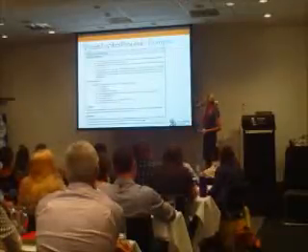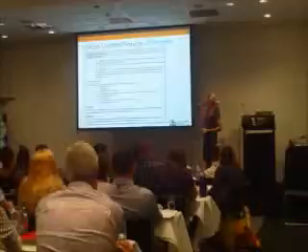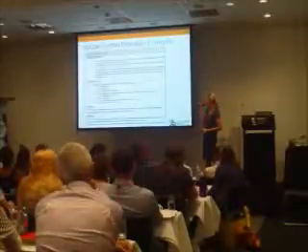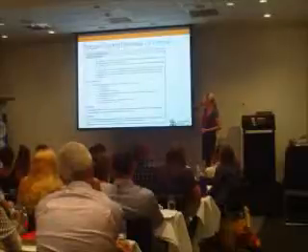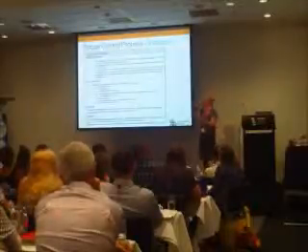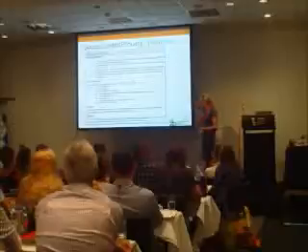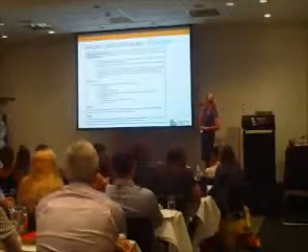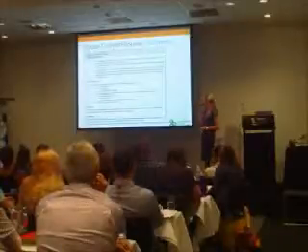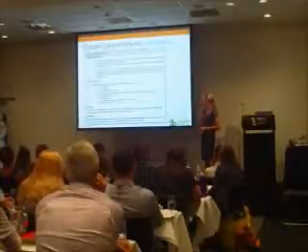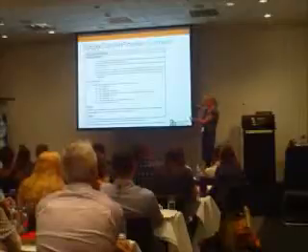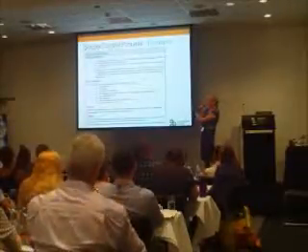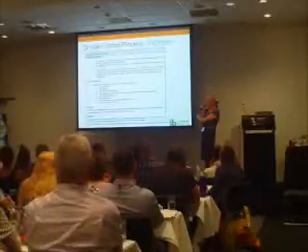Change evaluation. The project manager should determine how the change will affect the schedule, budget, contractor staff, the ordering, yada yada, the quality, the risks, the stakeholders, and the office move itself. So this is the example from your textbook. Solution. The project manager should recommend a solution to the change if a suitable one has not already been recommended as soon as possible, at least within 1 working day. So these guys are on a short schedule for this project, but you'll probably find on larger projects it could be a lot longer than that.